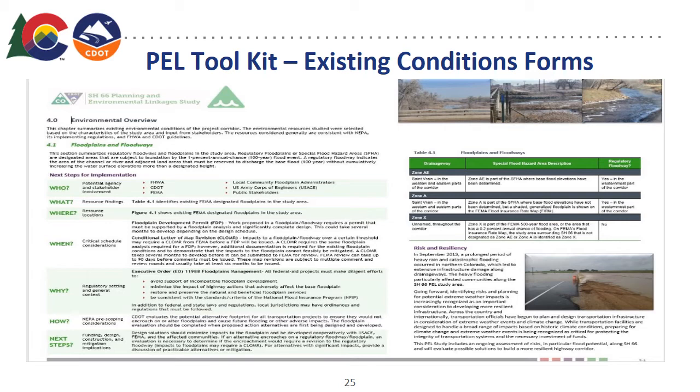As alluded to, the goal of a PEL is to help define the potential constraints and resources of concern, which help identify what will need to be focused on during NEPA, but not to do a deep dive into the resources. Most of the time, data used is readily available desktop data, and sometimes a windshield survey is conducted, but that's about it. On this slide is an example from our State Highway 66 PEL study, which I will talk about here shortly.